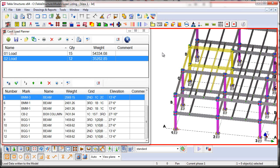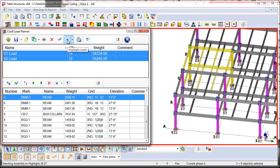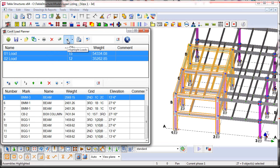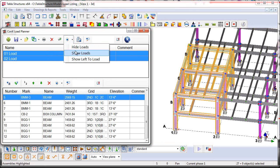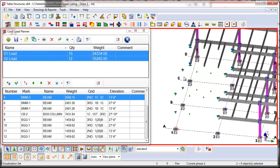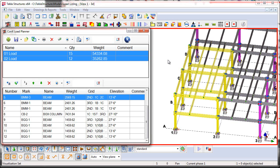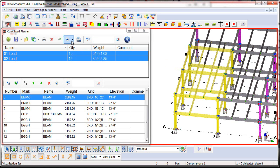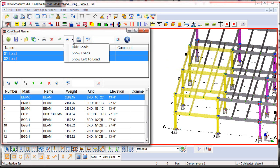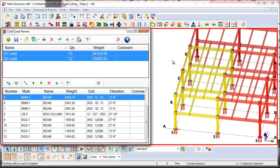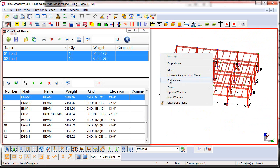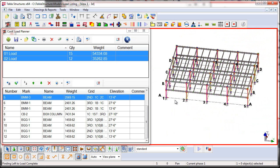At any time, you can control the visualization states of the loads that you've already planned. What I can do here is I can select the two loads, and then I can say Highlight, and it'll highlight the objects that are associated to those loads. I can also come in here and say Hide Loads if I don't want to see those particular objects, so that way they're out of my way while I'm planning and adding the rest of the objects in the model to the next set of loads. What I can also do here is I can go ahead and say Show Loads. That'll then show the visualization state to the loads that are already planned. The last thing that's really interesting here, though, is that I can choose the Show Left to Load option. What that does is it basically turns all of the assemblies in the model that are not associated to a load red, as you can see here. Anything that's already loaded will be transparent yellow. If you want to clear these visualization states at any time, you can just right-click and say Redraw View.